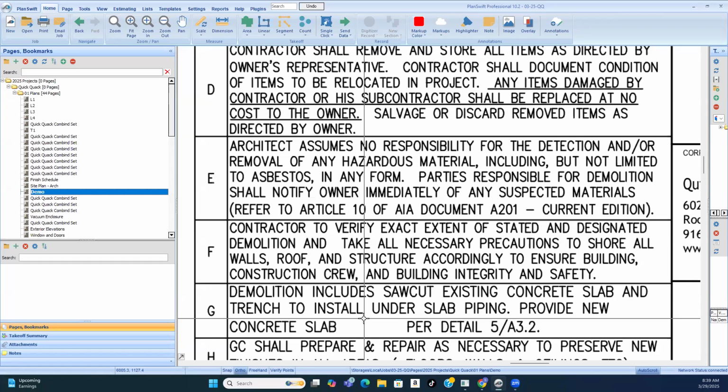or you exclude, right? Exclude all new concrete, period. That way, there's no question you're not installing the new concrete. And then if the GC sees that, they'll call you and say, hey, we do want you to install the new concrete. And okay, then you have to get a sub and figure out what that costs. But eventually, as a demo contractor, even if you did residential, you would probably have to figure out a way to get that back in,